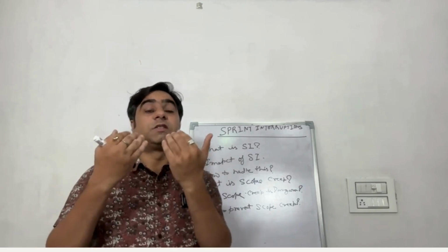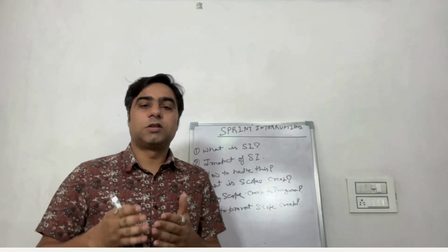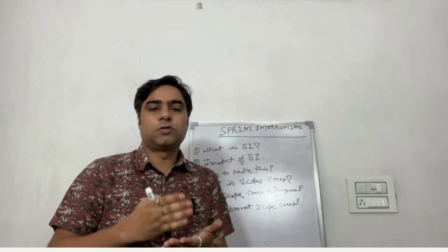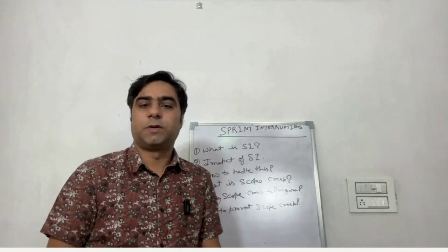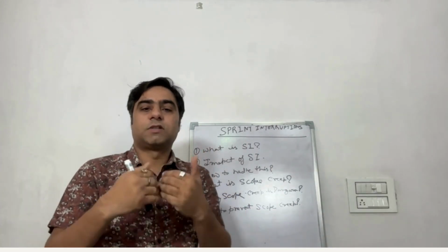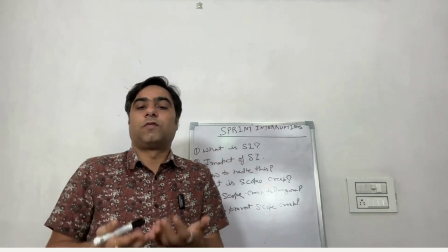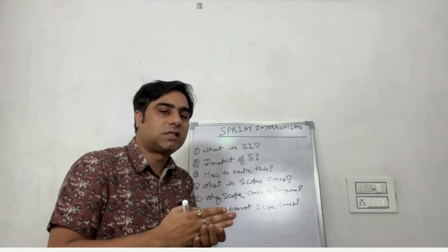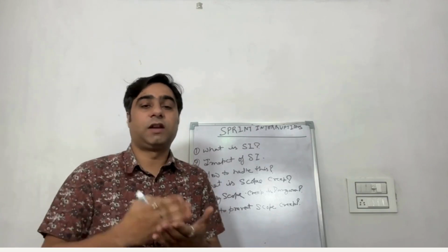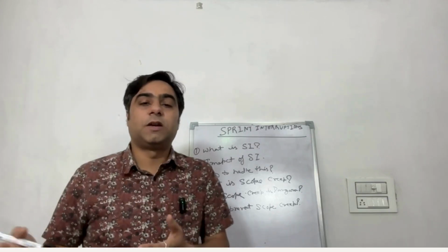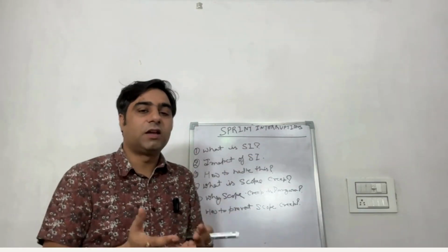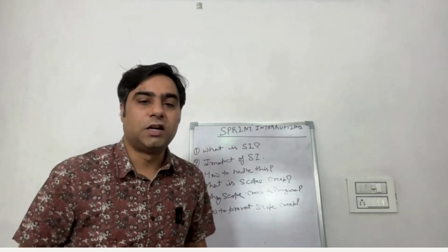This is something like a sprint interruption, because let's suppose your team is working on a sprint scope and someone comes and says production का issue है, fix कर दो. What is going to happen? This is a sprint interruption that will definitely hamper your sprint. So these are the kind of events that are called sprint interruption.